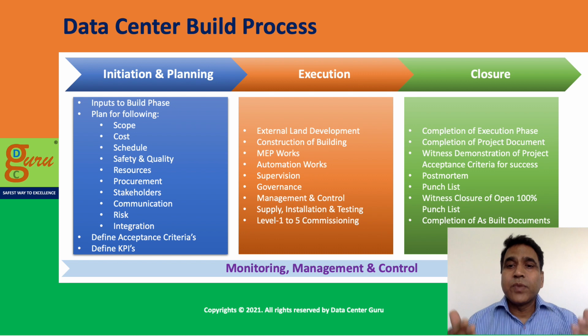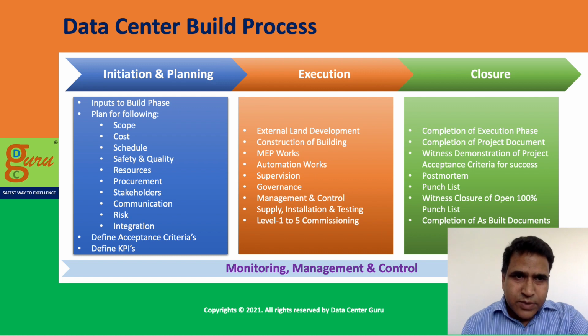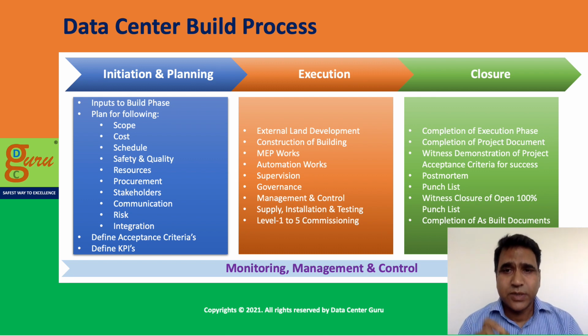Why? Because we are not able to manage the key deliverables, we are not able to manage the key controls in the project, which is the reason I defined acceptance criteria. We are not able to identify the gaps, identify the problem at the right stage and plug it. We have not defined the acceptance criteria for different systems adequately in the beginning itself. So those kinds of things create conflicts in the project, and then everything comes down at the closure part where you start struggling to close the project, close the contract.